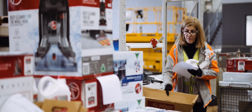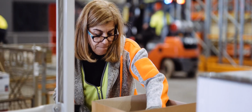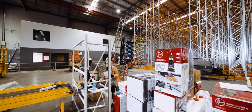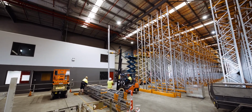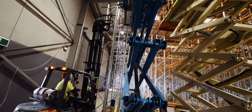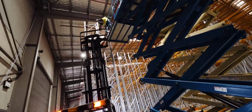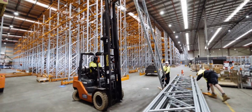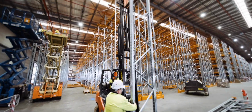The minute we got the handover, we organised the truckloads from our other warehouse the following day. So we had a less than 12-hour window between sign-off to when the first pallets arrived on site and into the racks. In this size project, we have obviously overlapping lease periods, and one of the critical elements in this project is to ensure that the project is delivered on time.